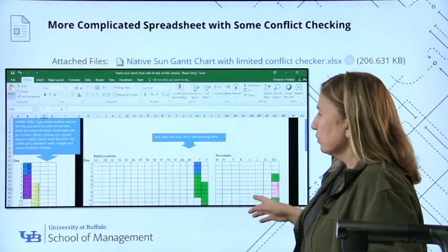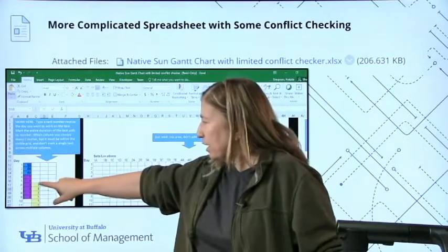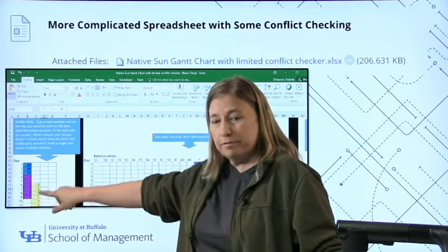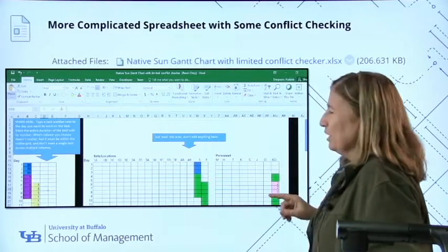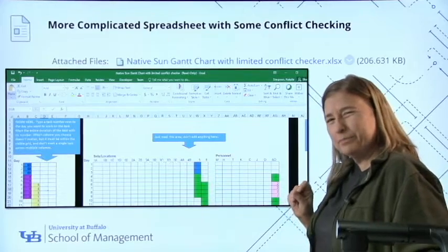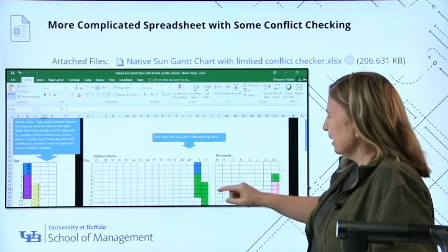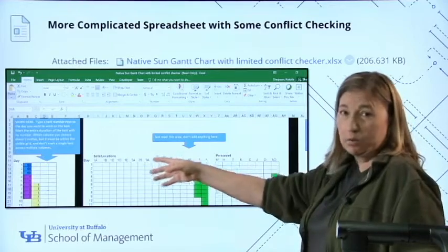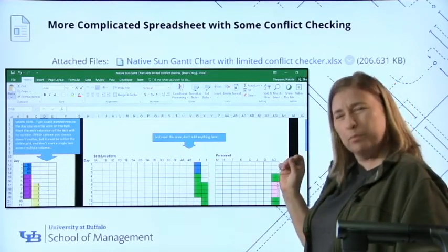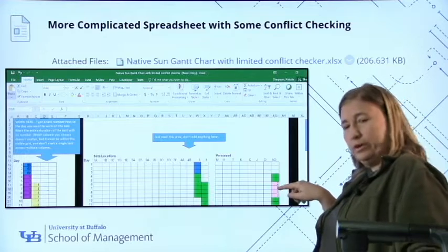And one feature of that is, now notice I've added something here. I added task 5 right here. One feature of it is, oh, wait a minute, that probably wasn't a very good idea, because I added task 5 when task 1 with this data is still going on, and both of them require the assistant director.